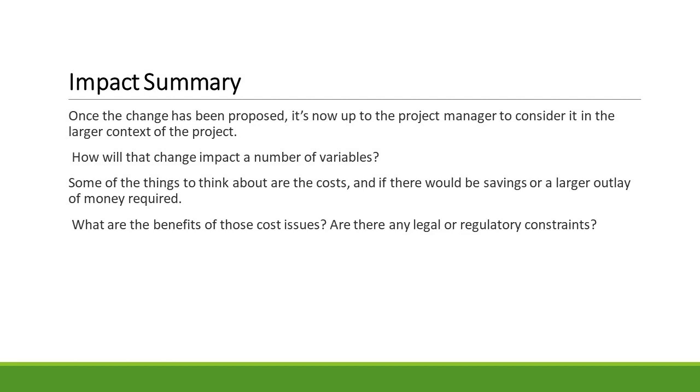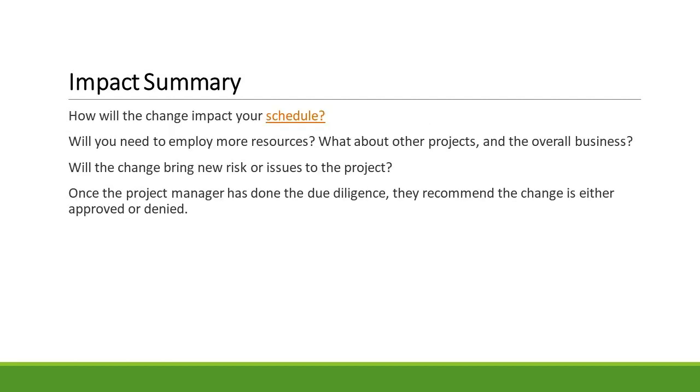Are there any legal or regulatory constraints? How will the change impact your schedule? Will you need to employ more resources? What about other projects, and the overall business? Will the change bring new risk or issues to the project? Once the project manager has done the due diligence, they recommend the change is either approved or denied.